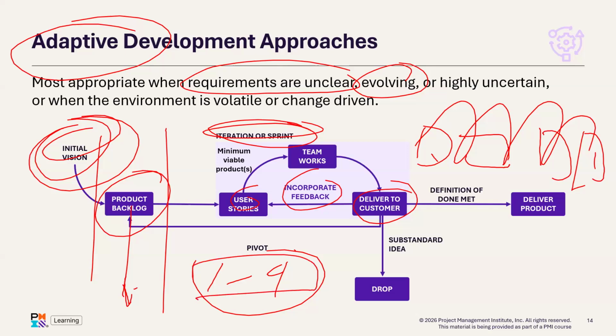And again, we call it a time box, iteration or sprint, because once the team starts building the engine, the customer cannot interfere. The customer has to wait till the team is done, at least assembling the engine and testing it. If the customer feels there is too much noise in the engine, the customer will give feedback.